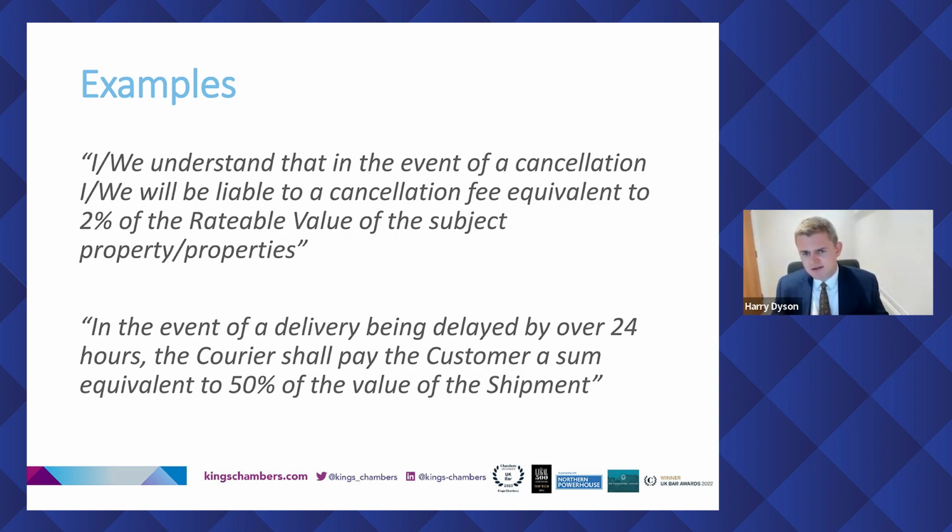We understand that in the event of a cancellation, we will be liable to a cancellation fee equivalent to 2% of the rateable value of the subject property or properties. So as you can see, it does give a sum, but it's a sum that's tied to the value of whatever properties the claimant was working on.